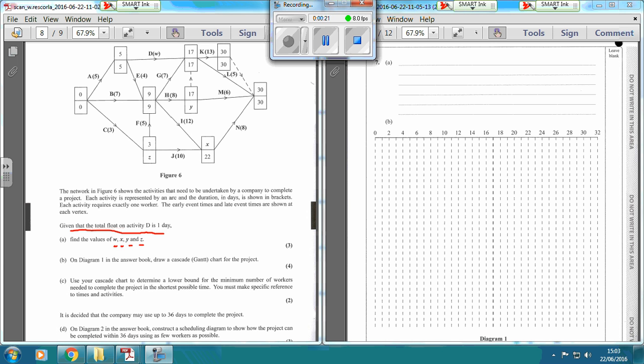So we've got total float here. It starts at 5 and it can end at 17, so we've got 12 days in which to do this. It says we've got a float of 1 day, which means we've got 1 day spare time, so therefore it must take 11 days. So W equals 11.